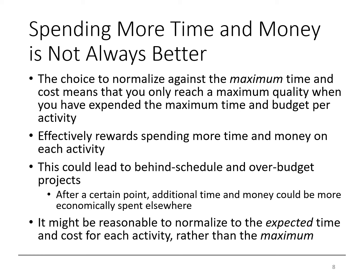However, this effectively rewards spending more time and money on each activity. From a project perspective, this could lead to behind schedule and over budget projects. In reality, for each activity, after a certain point, additional time and money could probably be spent more economically elsewhere. So it might be a reasonable assumption to normalize to the expected time and cost for each activity rather than the maximum.